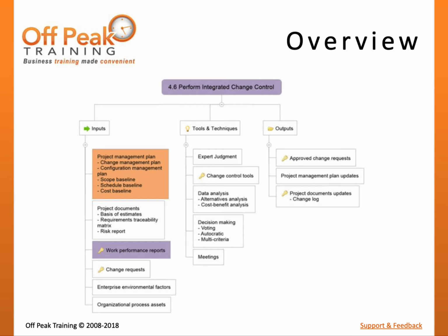However, since changing one aspect of a project can have a major impact on other project constraints, it is important for changes to be well controlled. For instance, if a change needs to be made to the scope of the project, potential changes to schedule, budget, quality, or risk need to be evaluated. This is the essence of the Perform Integrated Change Control process.